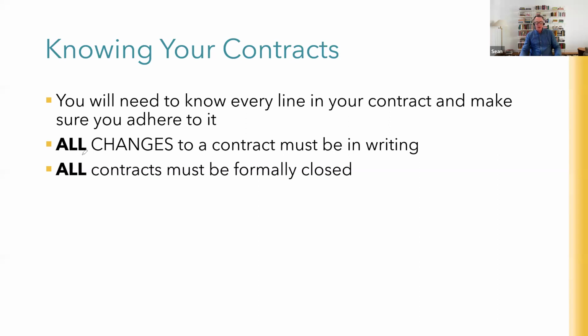Every single change that you make to that contract must be in writing. No exceptions ever. If you change that contract, it's in writing. Not just emails either, actually addendums or formal changes or new versions signed and executed by everybody. Remember, any mistakes or shortcuts that you make are going to end up in court, and that's the way you need to look at it.